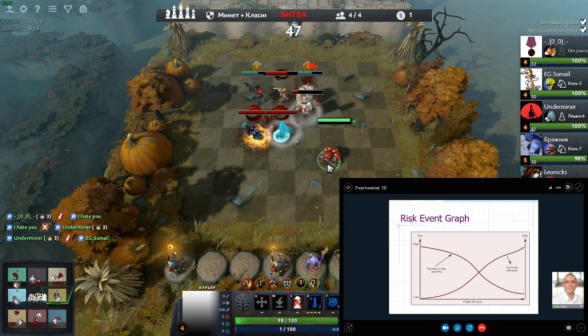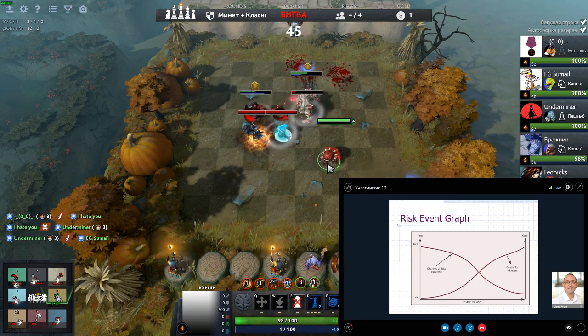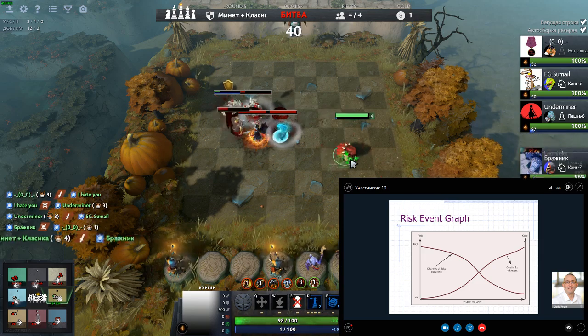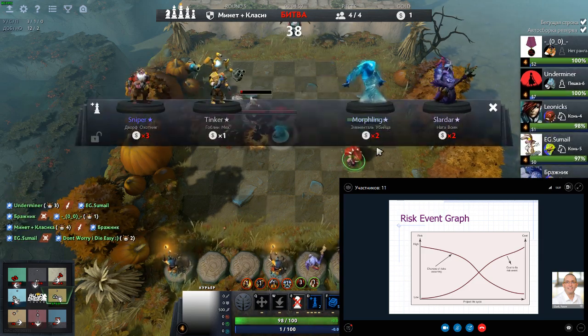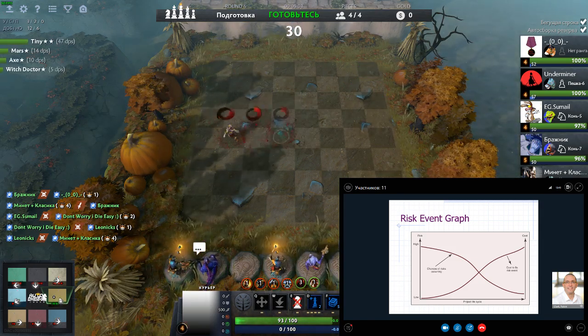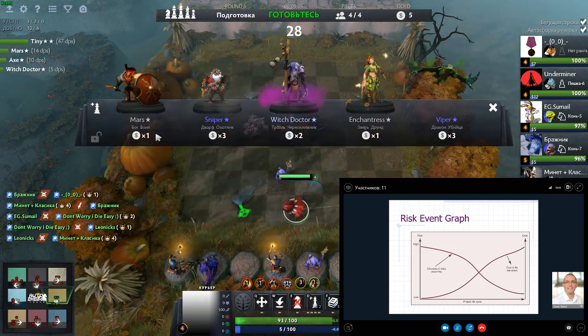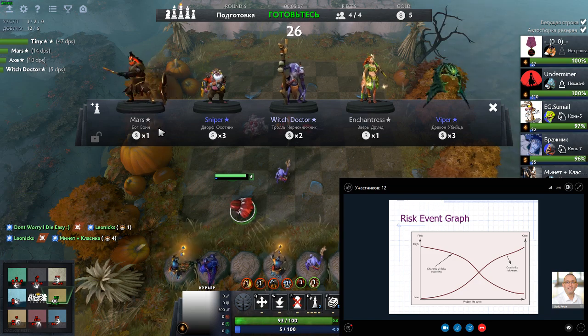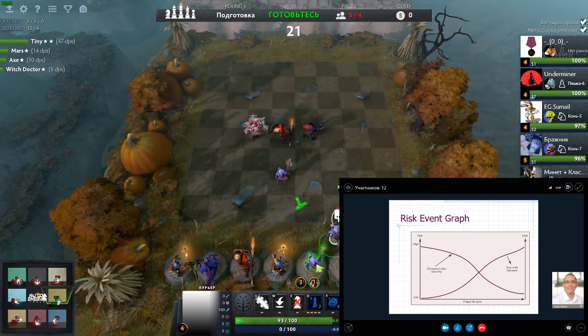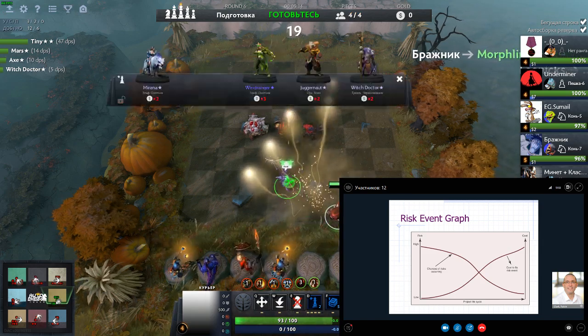So that's the line that starts high, goes low. Now, if we think about trying to rectify a risk before we've done very much work, it's pretty cheap. It doesn't cost us a huge amount of money. But if one of those risks actually manifests itself later on in the project, you can see that the cost to fix it goes up.